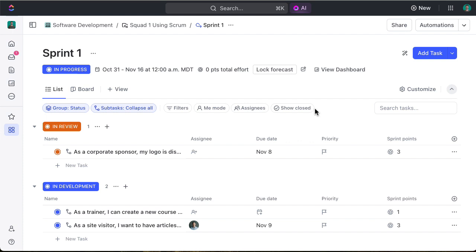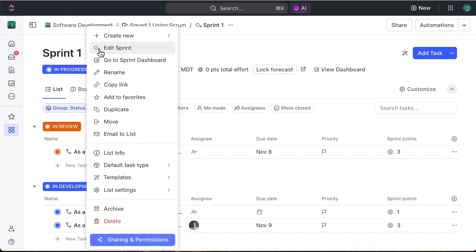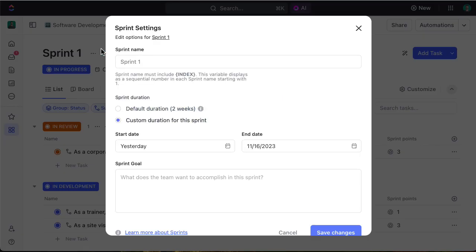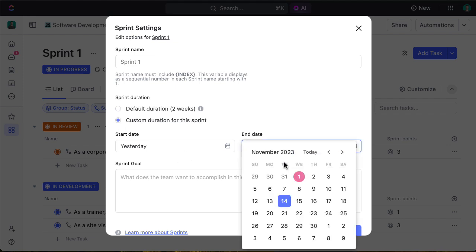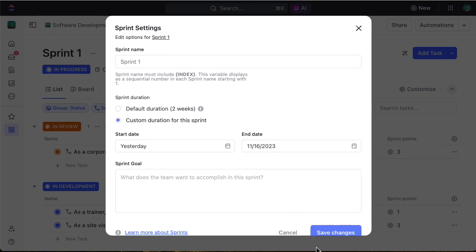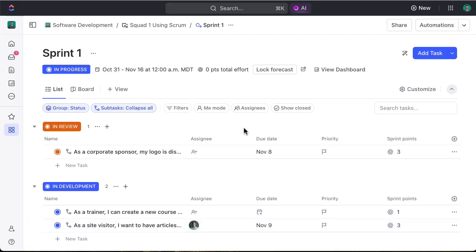This is now more nimble than ever. What that means practically speaking is that you can do things like changing the sprint dates outside of your standard bounds of say two weeks for example. Clicking on the edit and clicking edit sprint, you can either change the name and then either set your default duration which is the rules of your sprints, or go to custom and then modify those on a sprint by sprint basis. This is very powerful now because you can support days that might be holidays for the group or even support the leave of folks or if a team is on PTO for an extended period of time.